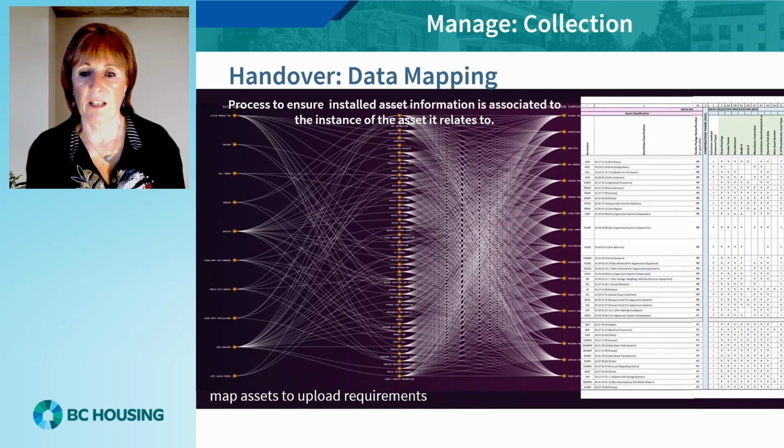This preliminary asset registry also allows for data mapping to the end source software to be tested and the final data export structure to be worked out and checked during construction, so that when the data set is complete prior to handover, the data transfer can seamlessly occur.